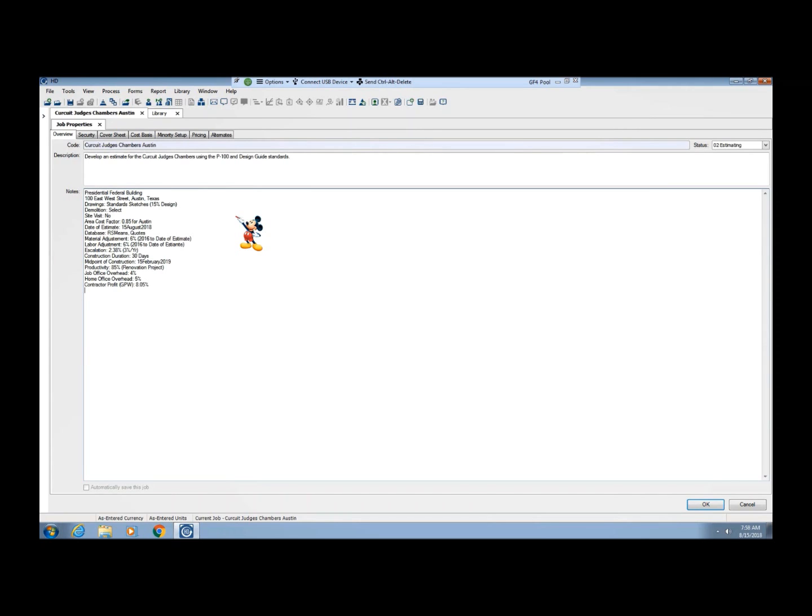The construction contingency, 10% is not uncommon, but again, put in what's appropriate. And we'll put in the line item for phasing, and this is a good place overall just to document your basis for the estimate, and that really is all that goes in there.